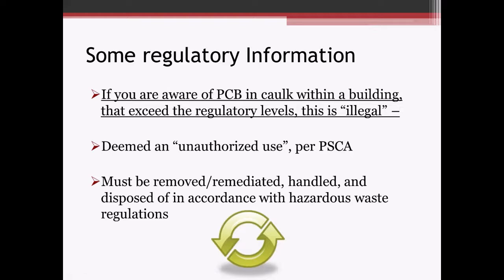So again, if you're aware of PCB in caulk in buildings that exceeds those regulatory levels, that's not allowed. It's deemed an unauthorized use and must be remediated and removed.